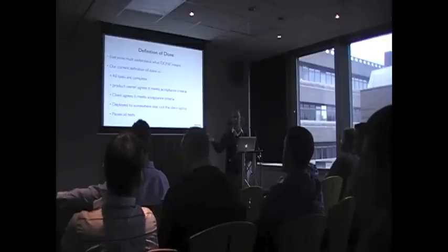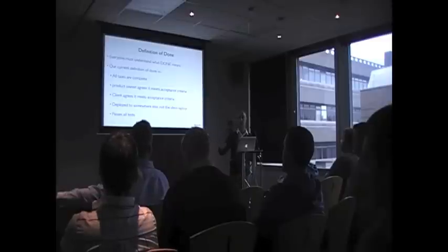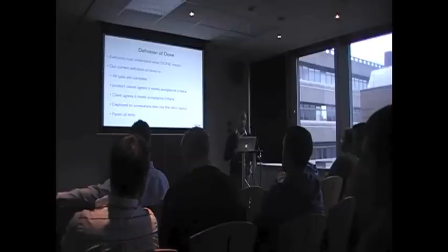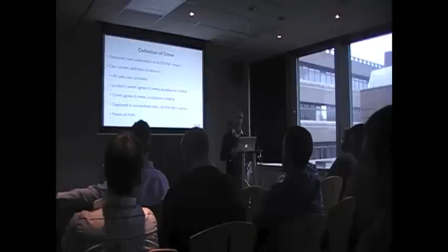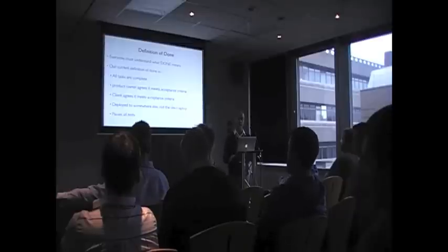Obviously, you stick it via TeamCity onto a server and IIS6 is on there, not IIS whatever, and that's not done. It's not working. It's not physically on a server where you can actually see it. And it passes all the tests, so if you did have TDD tests set up or anything like that, Selenium, blah blah blah, all those must be passed for it to be done as well.